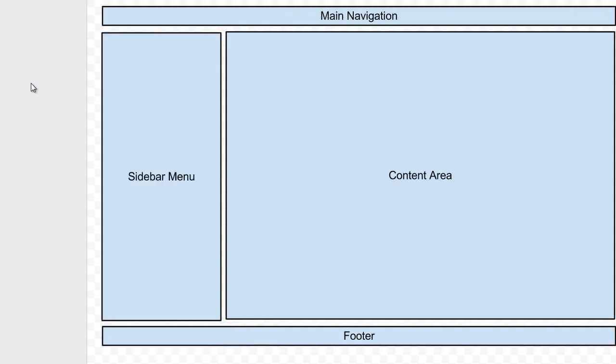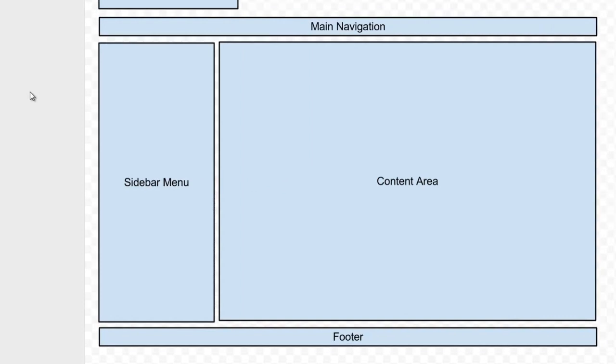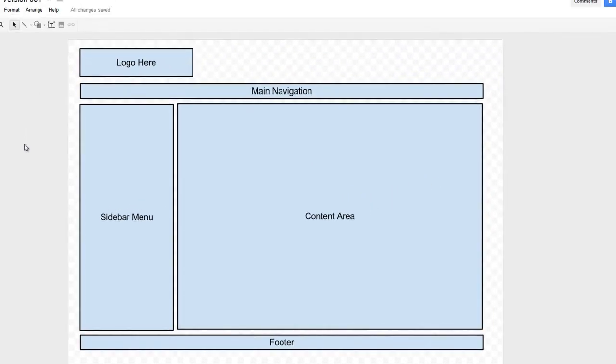And now our document has changed, and had we gone to the client with that first one and they came back with these notes saying, well, everything's great, but we want a sidebar menu here, we would then make a copy of this and call this version number 2. And we keep doing this until the client is totally satisfied. And we don't go past this point, or you shouldn't really, unless necessary.